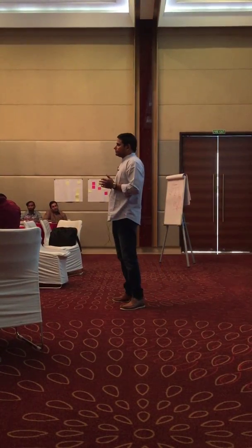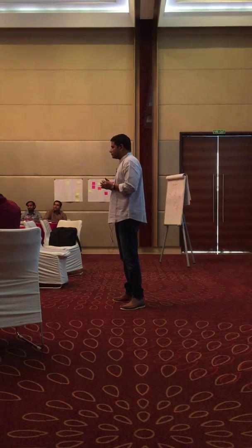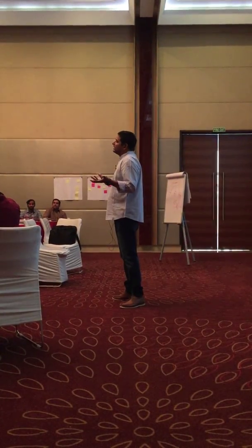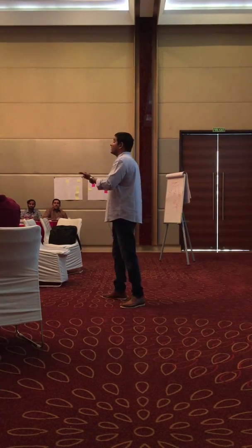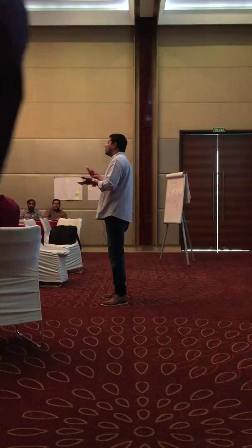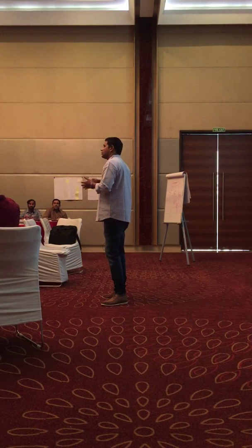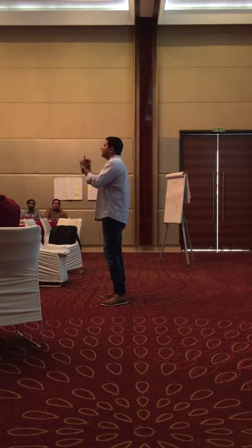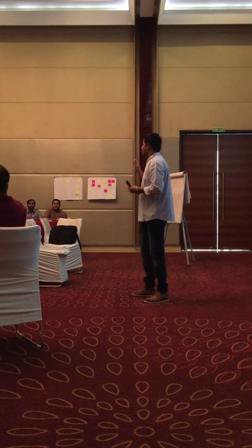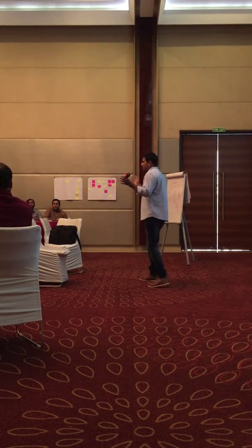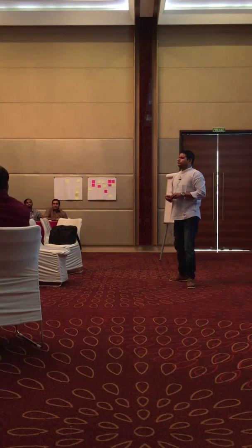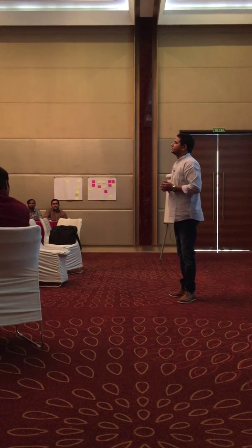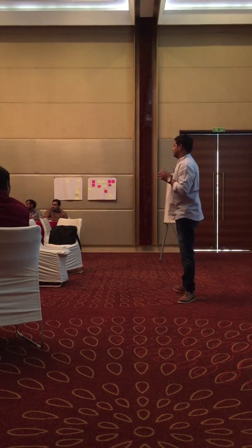But can we assume that an epic can be assigned to a sprint? You can assign, but what happens? You may not end up completing that. So what is principle number one? Our highest priority is to satisfy customers with early and continuous delivery. If you cannot deliver working software at the end of the sprint, it is useless. That is why we are taking smaller things. So, very simple. You put a lot of items and a lot of rice in the plate, right? How much can you eat? Same thing here. Clear? No questions?